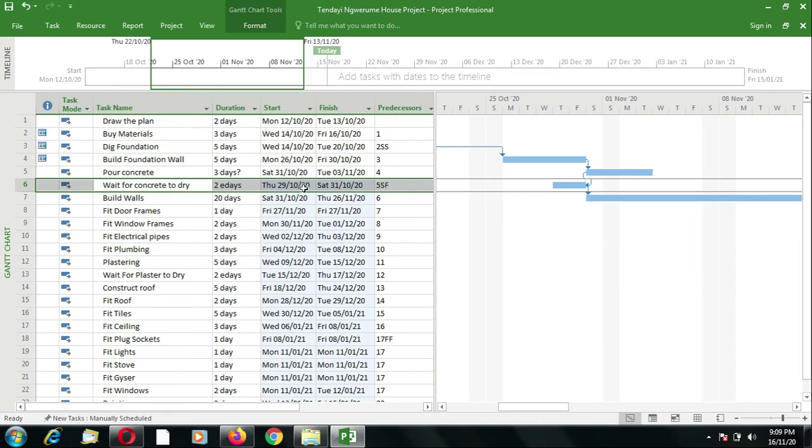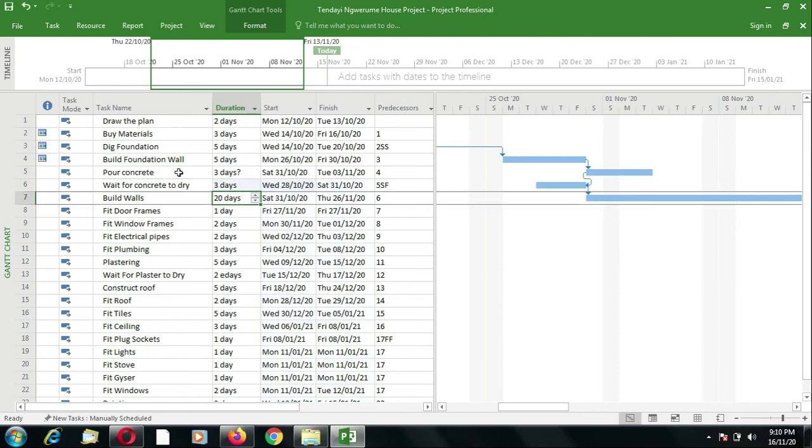Then the next activity must finish after this one has started. So in other words, it should have started earlier in order for it to finish when this one is starting. So that is why it moves this activity backwards. So even if we increased the activity's days here, say to 3 days, 3D, it extends it backwards.